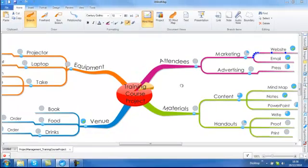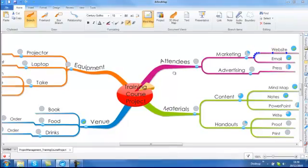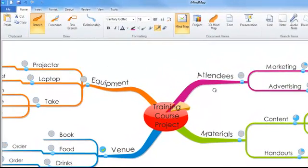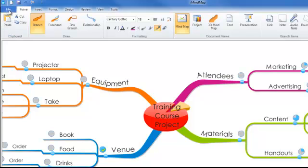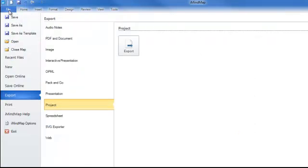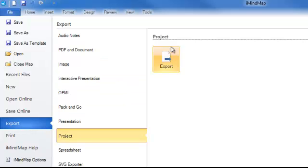Finally you can also export your project to Microsoft Project. For those of you who are used to using tools such as Microsoft Project or have people within your company who use Microsoft Project, you can then begin your project within iMindMap. You can then export to Microsoft Project. To export simply go to the file tab. If you are using a Mac click on the file menu button. Go to export and project and you will simply click the export project button.